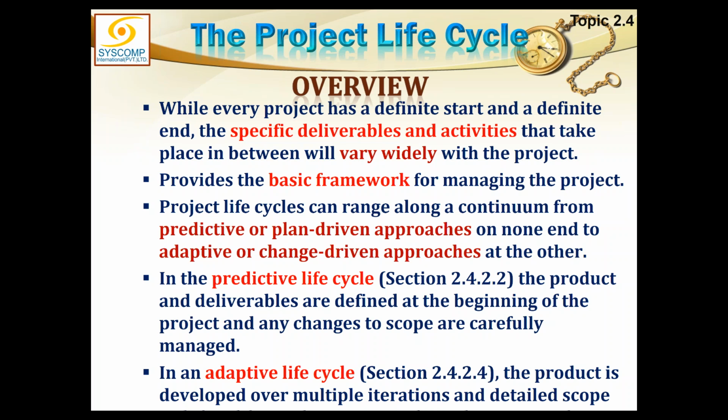We segregate the project into surgical portions, which we call phases, and every portion is supposed to be delivering something important. So it is the importance of the deliverable which makes up the phase. The first phase could be 3 months long and the next phase could be 9 months long. This all depends upon the deliverable we are trying to deliver out of that phase.